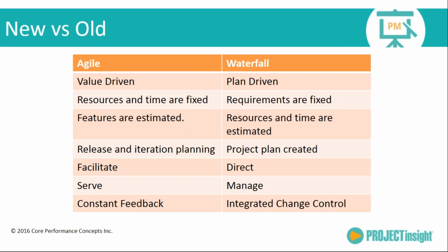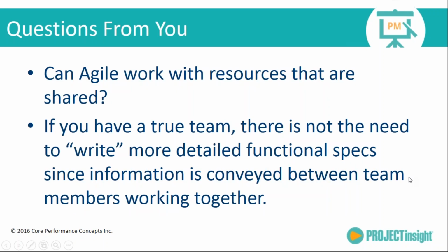And also, if you require constant feedback in order to ensure that you understood the requirements well enough, then use more of an Agile. If your contracts are fixed and any change is going to result in a change request, and that's the contractual agreement that you have, maybe lean more towards waterfall. So again, it does depend. I want you guys to think about the appropriate use of it versus an absolute use of it in any particular situation.